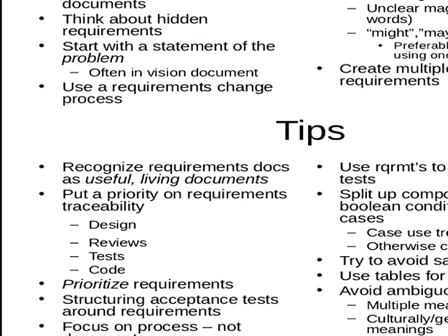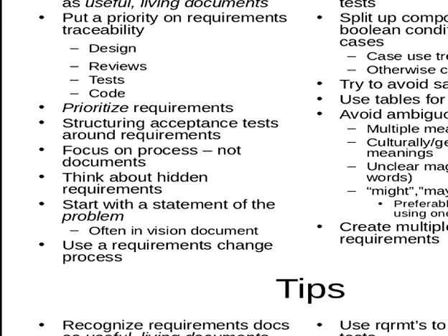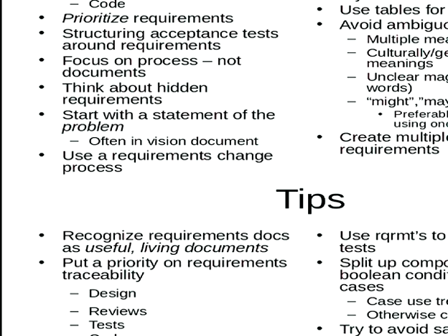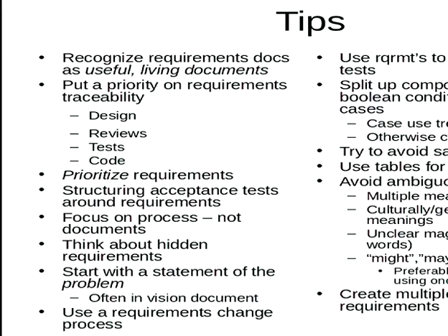What things can we now avoid working on the design side or the test side or the code side as a result? So you decide, okay, that's a bridge too far. We don't want to do that this round. What other things can we leave out as a result? And by linking these up, you can get that understanding. Prioritization of requirements is really important. Being able to say, okay, which of these requirements are more urgent or more central to success, and which things are more kind of wish lists.